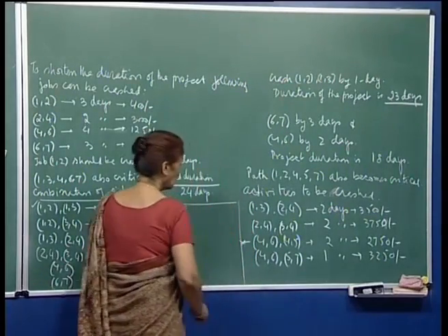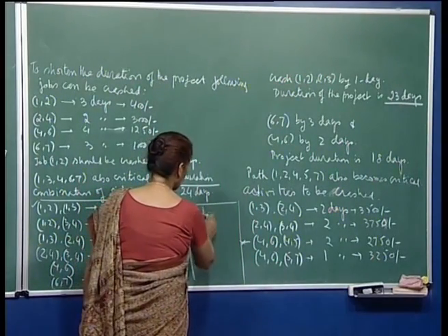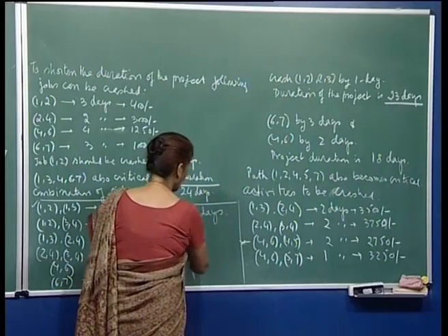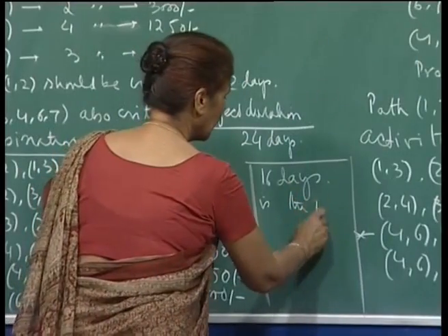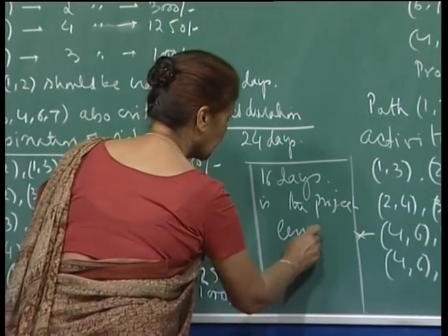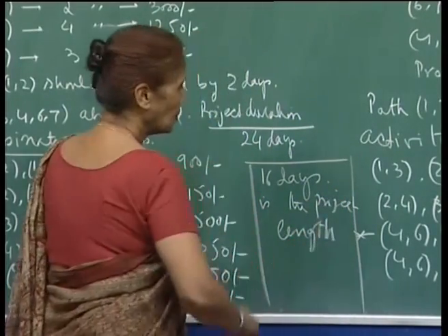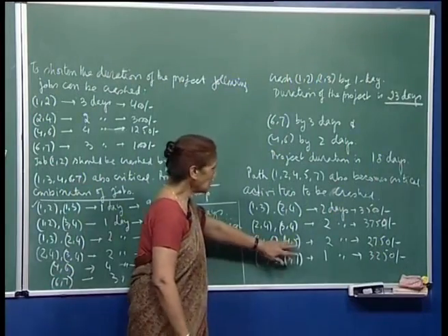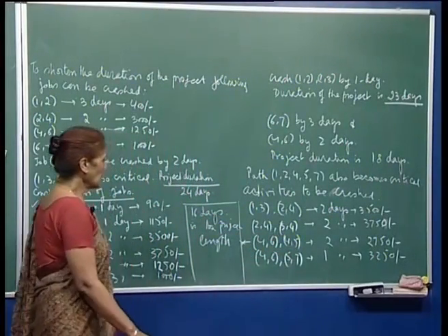So, therefore, this gets crashed by 2 days, and so, lack of space, maybe I can do it here. So, now that means 16 days is the project length, right.